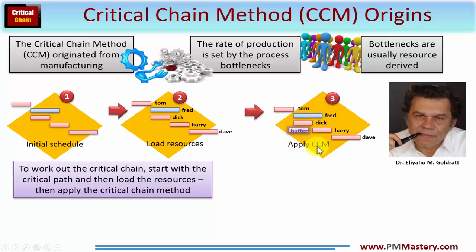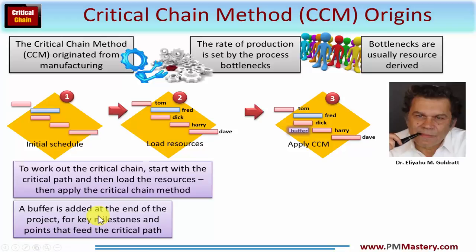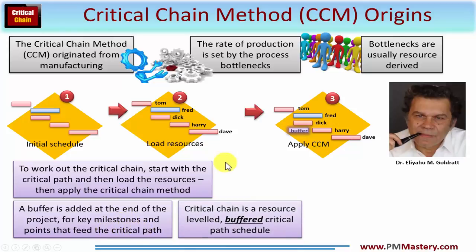Step three is to apply the critical chain method, which I'll explain very shortly. What you'll discover is that a buffer is added at the end of the project, and there's a buffer for any key milestones and key points that feed the critical path. Put at its simplest, critical chain is a resource-leveled, buffered critical path schedule. If you're fairly familiar with resource leveling, you'll see that apart from the use of the word buffer, there isn't much different in creating a Gantt chart with loaded and leveled resources.